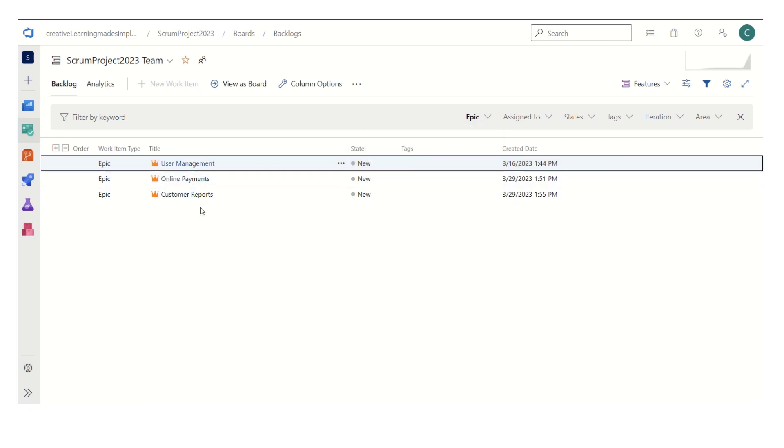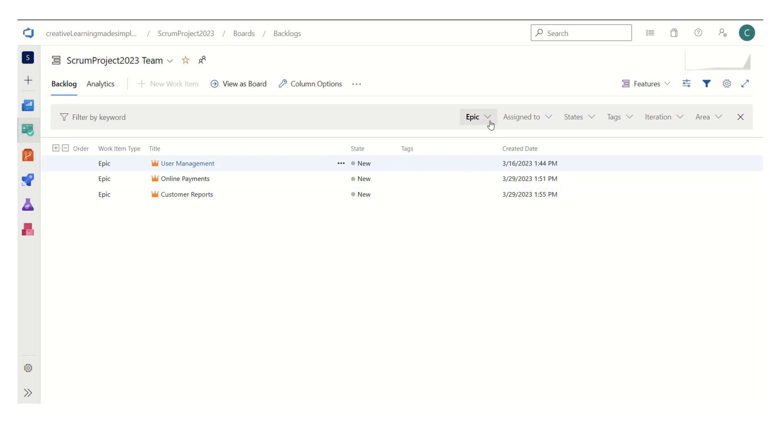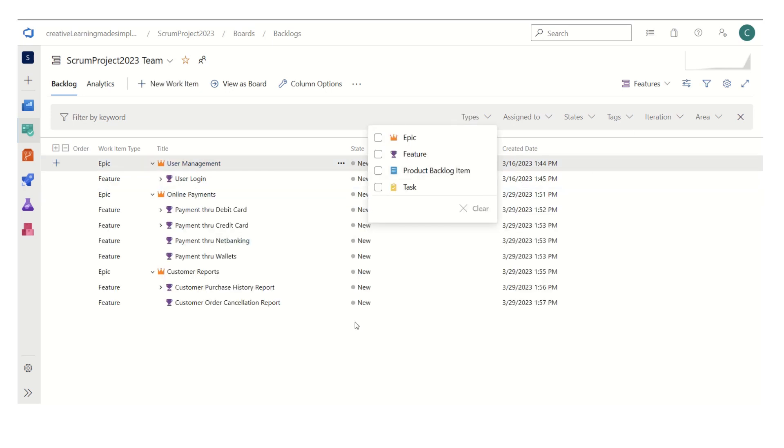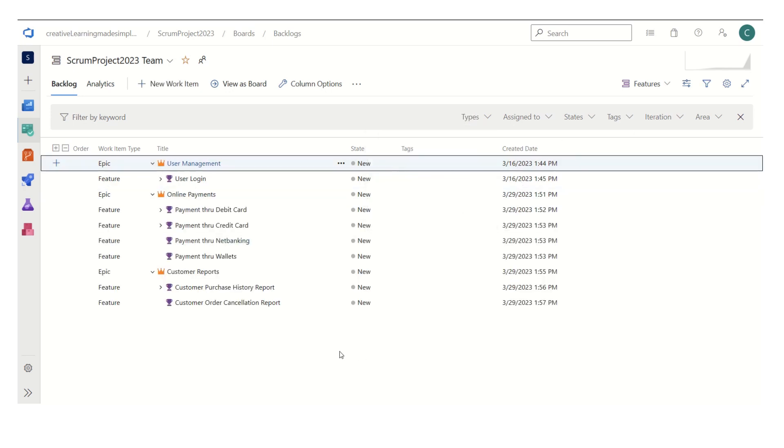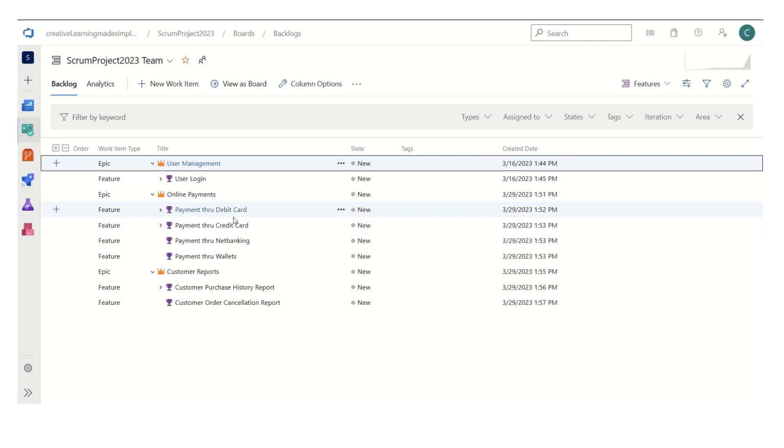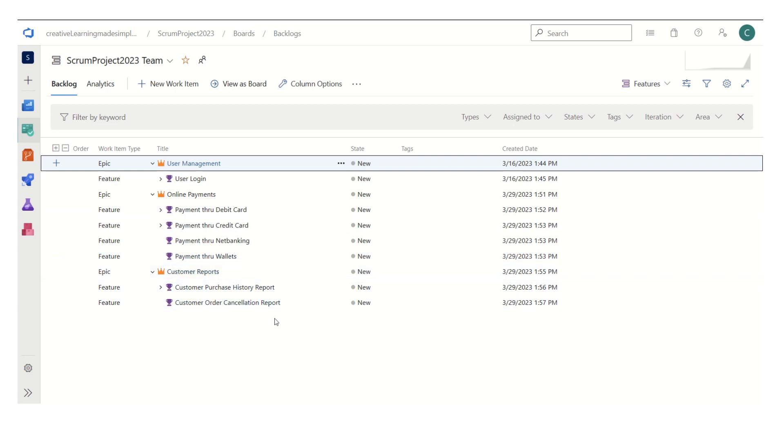online payments, and customer reports. Now if I clear this one, user management epic consists of a feature user login. Online payments epic consists of four features: payment through debit card, payment through credit card, payment through net banking, payment through wallets. And customer reports epic consists of two features: history report and the cancellation report.